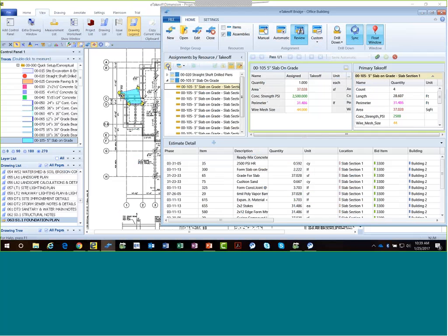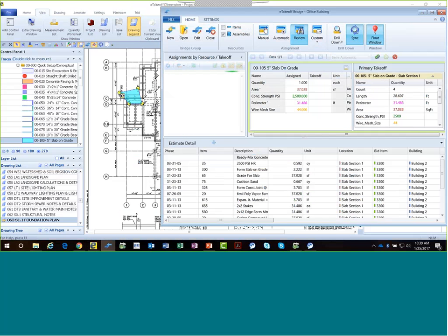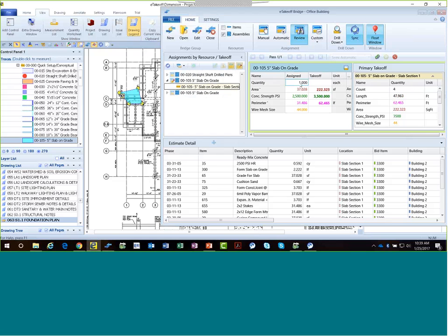I can hit refresh, and it's intelligent enough to know that you made some changes on the takeoff. I see that you have an item here that's changed. This little pencil mark tells me it's changed, so it's itemized it, and it opened it up and said, here's what your numbers were before, here are the changed numbers. What do you want me to do? Well, let's go ahead and accept those. So I'll click this to accept and apply that. So now it's taken these changes.